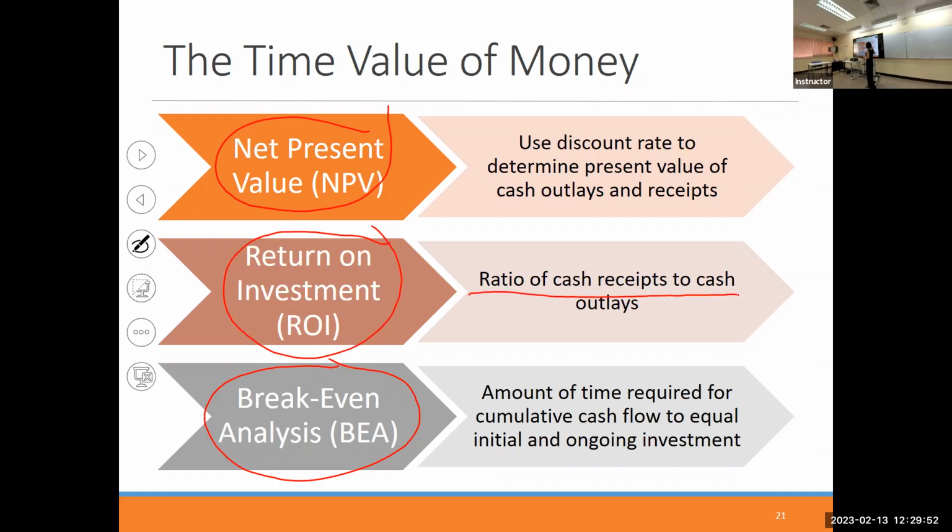Return on investment means the return you expect to have after you do the investment. So we expect every investment should give some return. If not, then of course you are just paying and losing the money if it doesn't give you a return. Break-even analysis allows you to estimate, calculate and analyze, after you make this investment, how long or when in the future you get the return back from your investment.